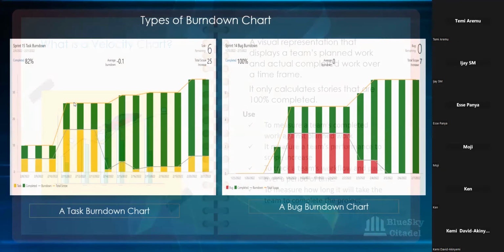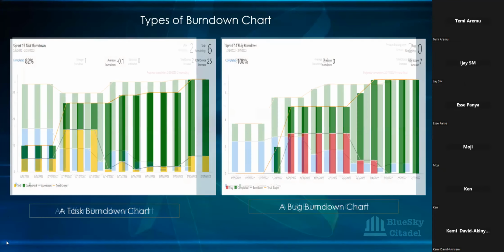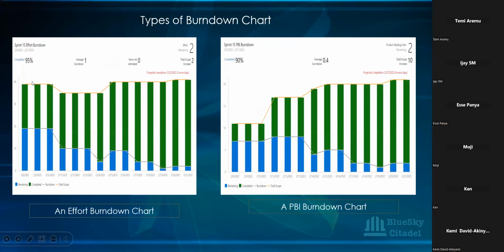Okay, good. For these 3 days now, this is even a task. I'll come back to that. At the beginning over here, you can see that everything we've committed to, we have some green there. But there are times when you see the gray line, which is your burn down line, just going straight. What that is saying is that over those days, nothing was completed.